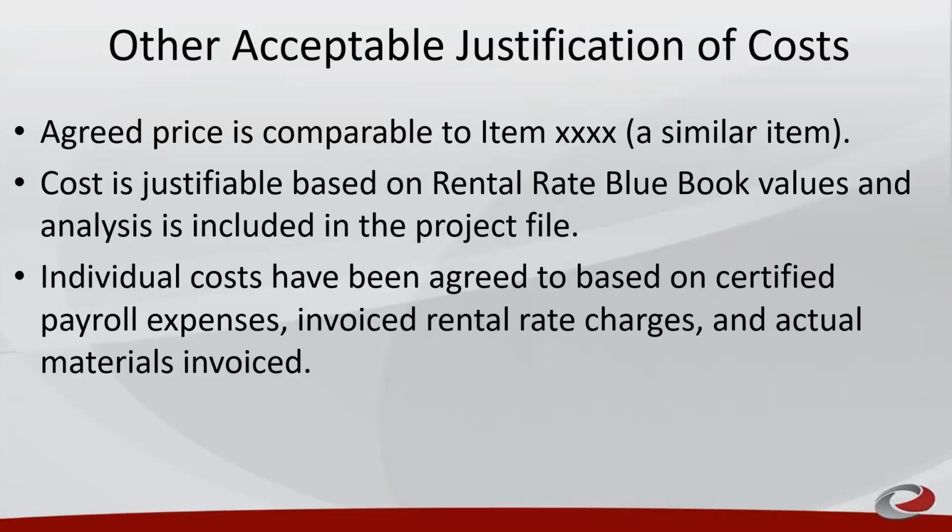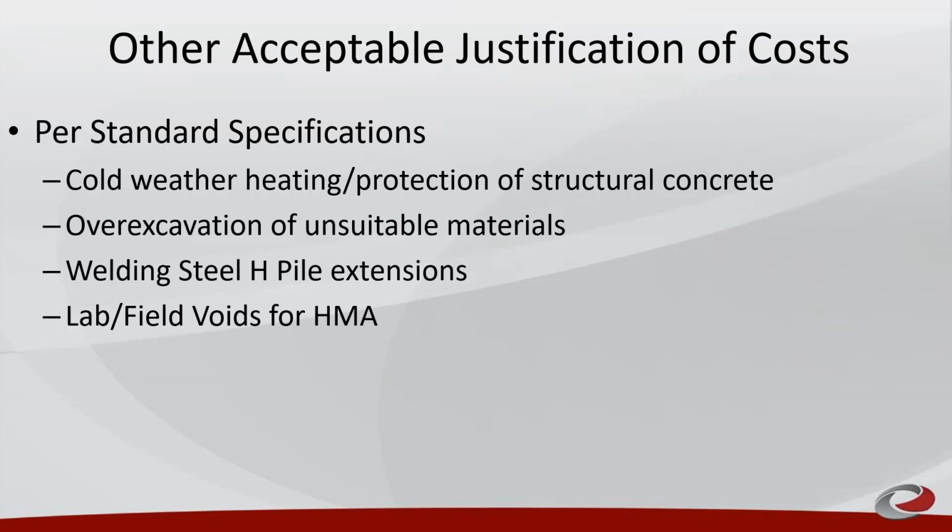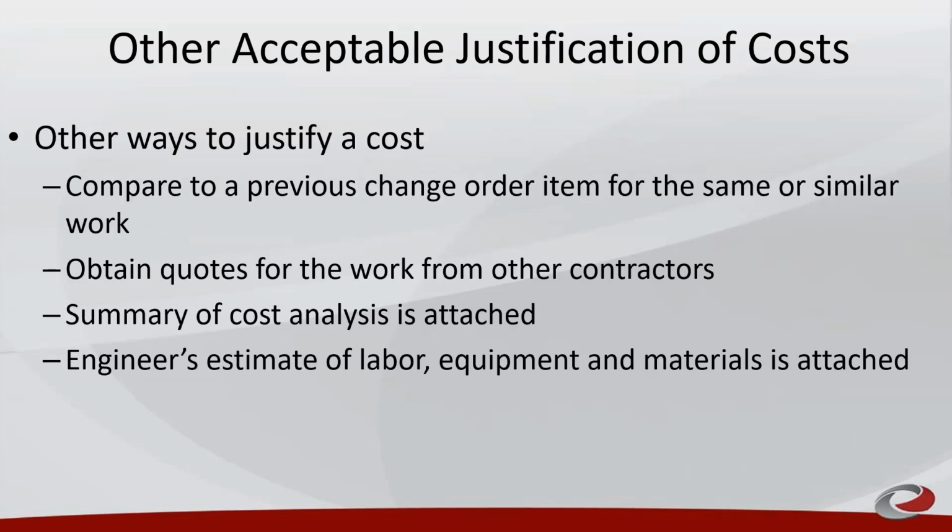There are other ways to justify cost. Compare to a similar item, cost analysis based on Blue Book values, payroll expenses, rental rate charges, and actual materials invoiced. And costs can be justified by referring to the standard specifications. Here are a few more ways to justify cost.